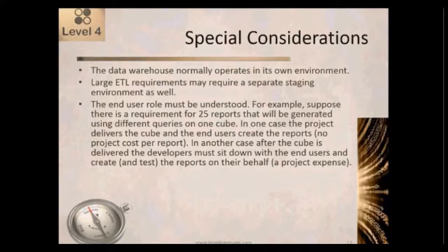In another case, after the cube is delivered, the developers are tasked with sitting down with the end users at a whiteboard or whatever and creating the reports on behalf of the users and then testing them to make sure they work and so on. So in that situation, each of those 25 reports would represent some project expense.